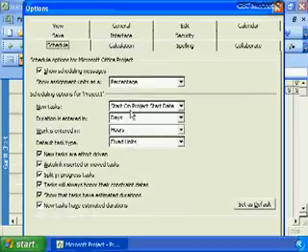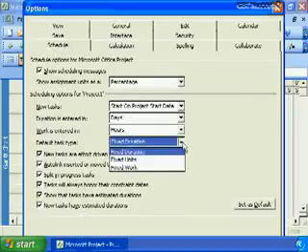And that is this field right here, default task type. When Microsoft Project is first loaded, it will set as default task type is fixed duration. As you see from this list box, there are 3 types of task types: fixed duration, fixed work, and fixed units.